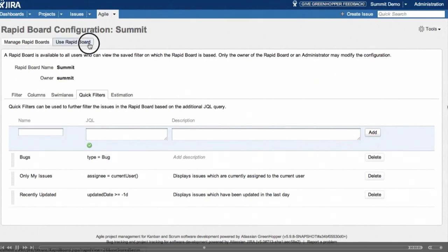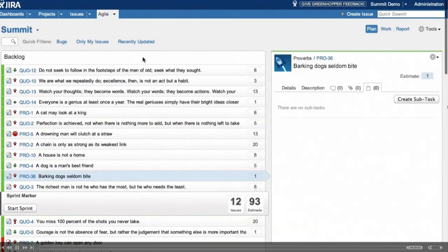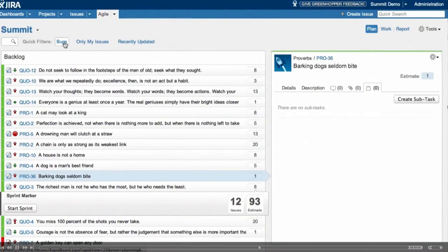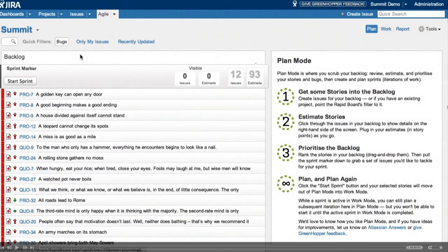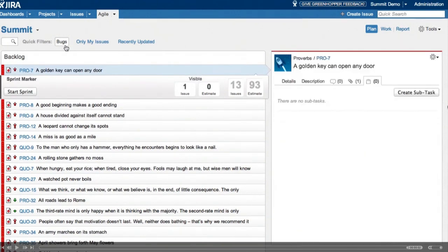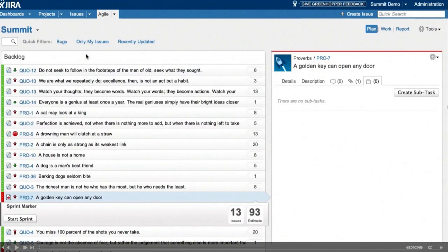So if we click this, our backlog is reduced just to show the bugs. And I can see the one I want there, so I'm going to drag it into our planned sprint. And clicking the quick filter again just brings back the whole list.